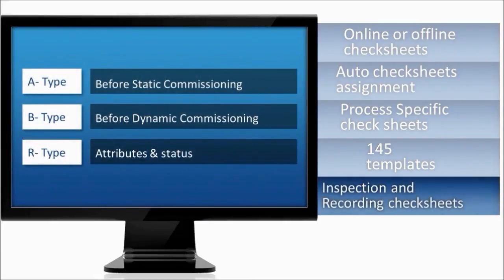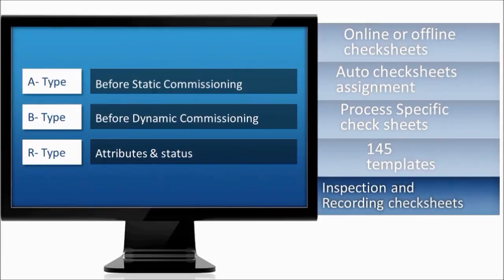SPE Systems completion offers industry standard A-type and B-type check sheets, as well as R-type check sheets to record information from commissioning.